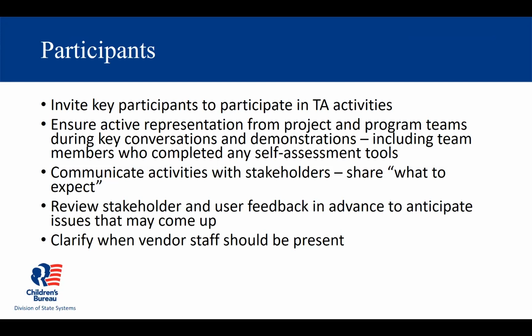It's also been very helpful, we've discovered on reviews, if the project team has previously reviewed stakeholder and user feedback in advance so that you're aware of the issues that we may be hearing about. This is very helpful because if you're already aware of them, you can often come up with a plan or prioritize them and how you want to deal with them. Then if we start to discuss them, you can just lay that out and it makes things move much, much faster.